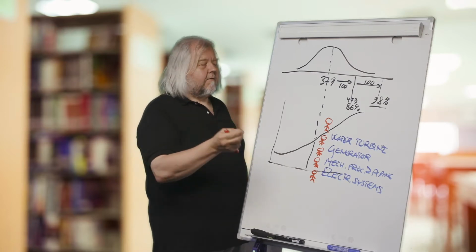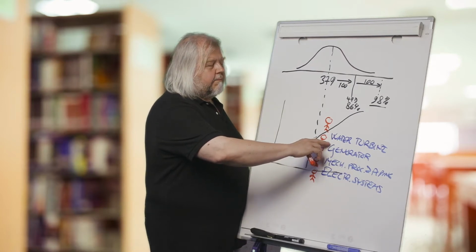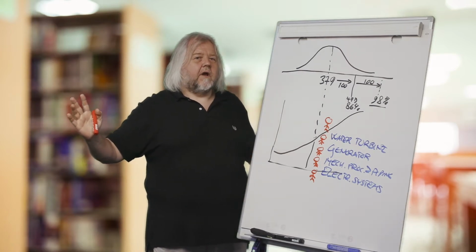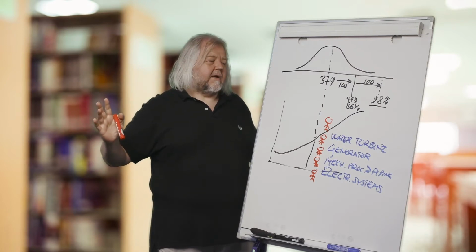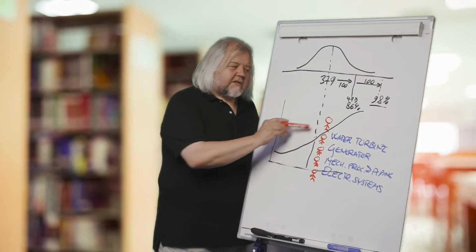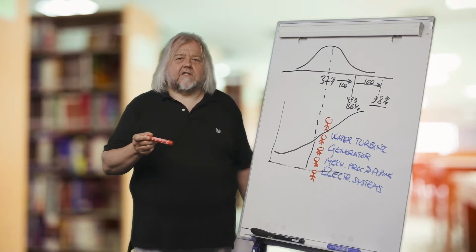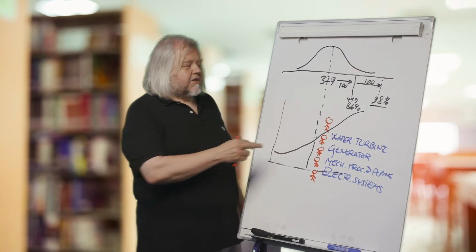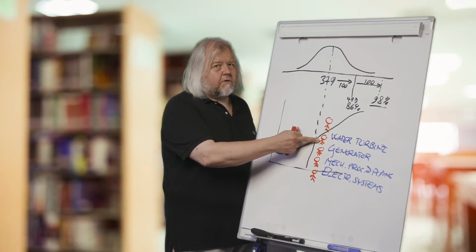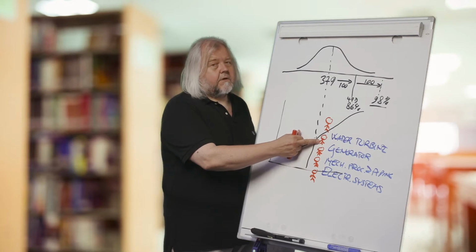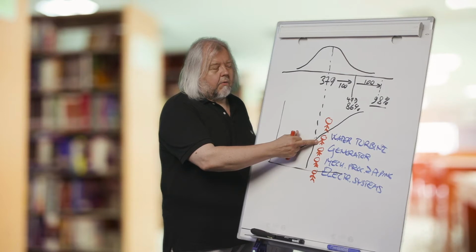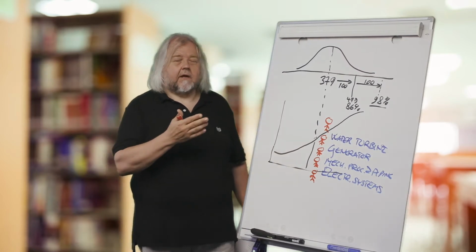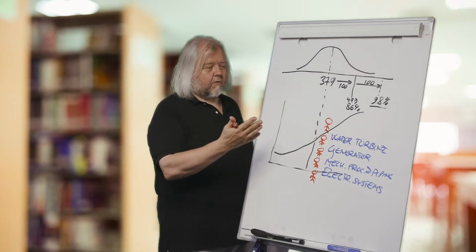But maybe the most important thing was that the water turbine person originally provided his estimate of minimum and maximum being quite far from each other, the variation being quite big, indicating a big risk. So the business unit director reacted very strongly to that and asked why there is such a big cost variation, why the risks are so big. And the explanation was that this water turbine expert was using a rather cheap supplier, with risks of even quite low quality, and maybe risks of adjusting the water turbine on site even if the quality is not right.